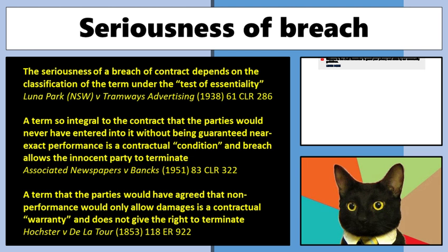And that is to be contrasted with the other type of contractual term called a contractual condition. A condition is a major term. It's something that if one side entering the contract would have known that this was going to be breached, they would never have entered into the contract in the first place. It's substantial and goes to the heart of the contract.